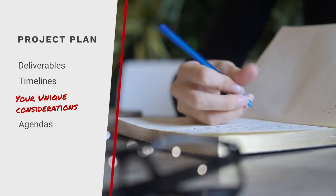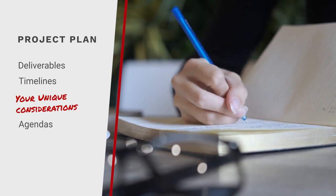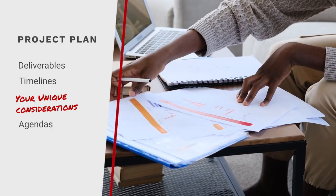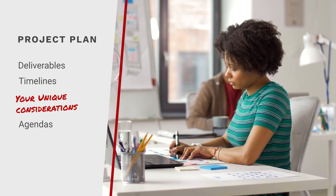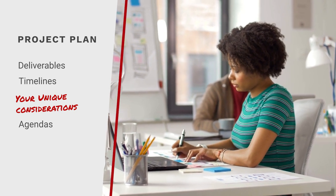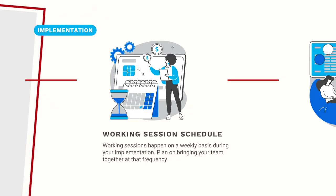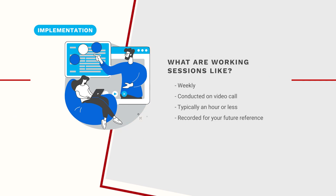The project plan will contain agendas for each working session during the project, and these agendas will be updated as the project progresses. Implementations typically run for 8 to 12 weeks after kickoff. Plan on connecting with your implementer for a working session each week during that time. These sessions are conducted by video call and typically are one hour or less.